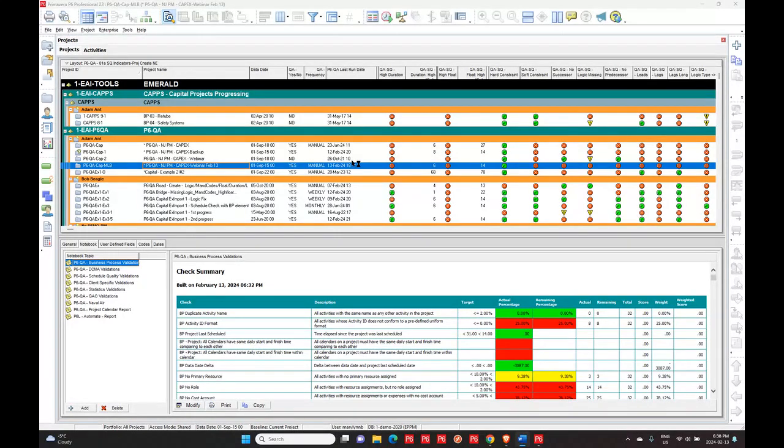You're running off management reports, and all of a sudden the numbers are sideways. That's happened several times. And what was happening is there's a coding structure in the file where each activity that fits a certain criteria gets a certain code. That pushes it to the management report.